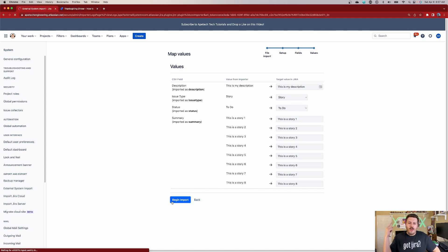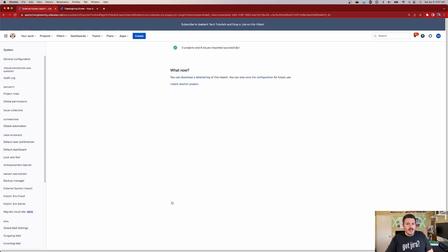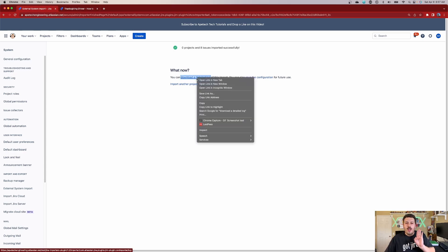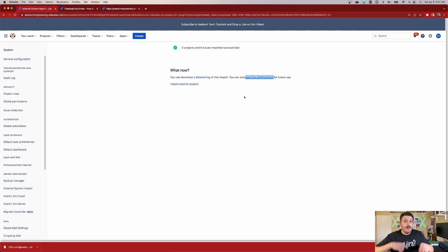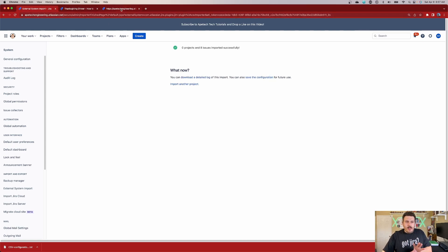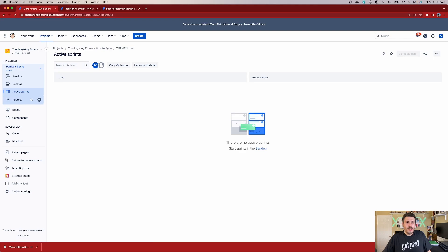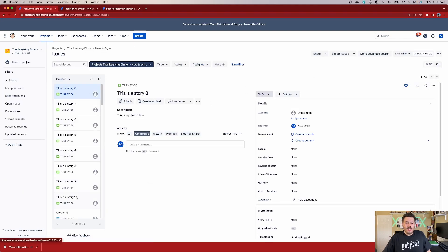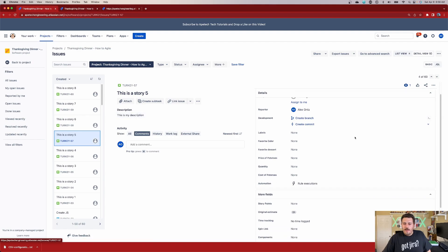My favorite part of the whole thing is we get to watch paint dry. This import is going to be very quick for me, but most of the time it takes a few minutes because I'm usually importing up to 1,000 issues, which is the limit. Once it's done, I recommend you right-click the detail log and save it, and save the configuration as well — especially if you'll be doing this multiple times. Now go to your project, go to Issues, and you should see your issues. As you can see, issues 53 through 60 — my eight imported issues — are right here with the titles, descriptions, statuses, and issue types all came in correctly.